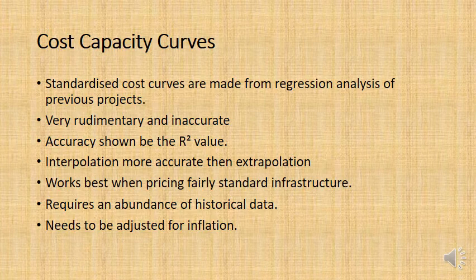What you're basically doing with regression analysis is you're getting a whole set of data from previous and similar projects of a similar type, and you're comparing the size of those projects against their overall cost. And then you will basically have a scatter graph of lots of different points, and then you will put in a line of best fit.